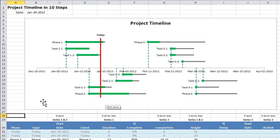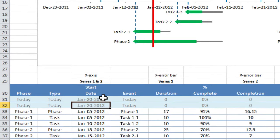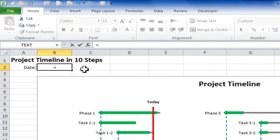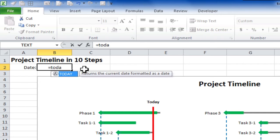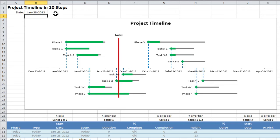And the last thing I'm going to do is show you how these formulas are linked. So there's a formula here in cell C31, C32. They both point to B2, which is the date here. And to make this dynamic, you change it to today. Enter. And as soon as the date changes, the today bar will move with it.